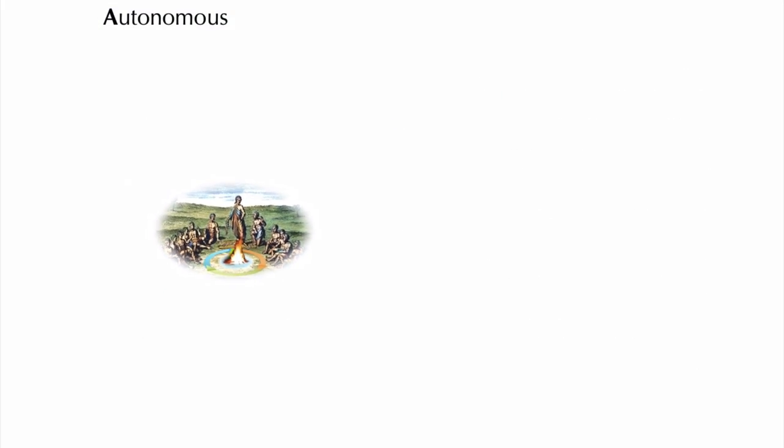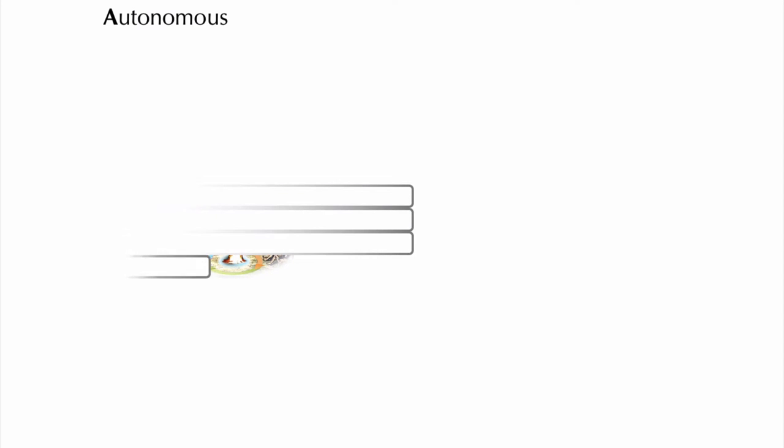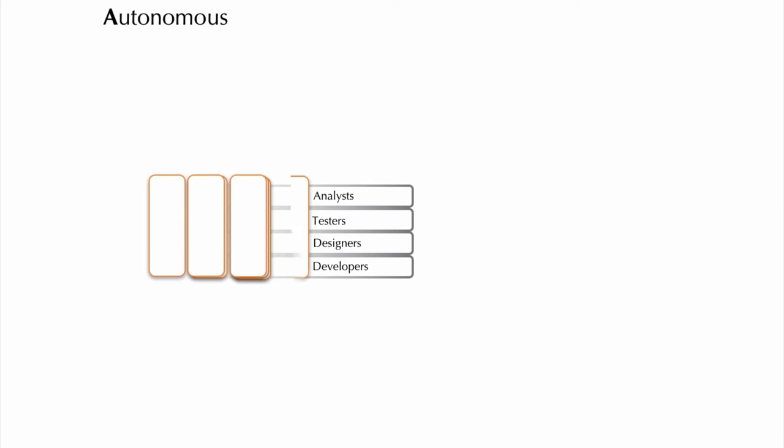In an agile feature delivery squad, each story attaches direct responsibility to one or two individual team members. We call it a feature squad because the story backlog zips up to represent the team's delivery of one releasable feature at a time. This is a form of mission command that drives productivity and quality, but has the disadvantage of impeding the flow of learnings between the squads.